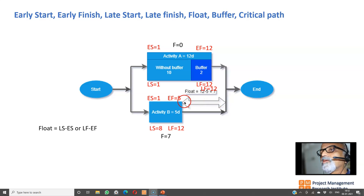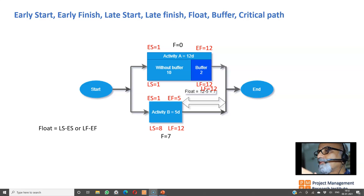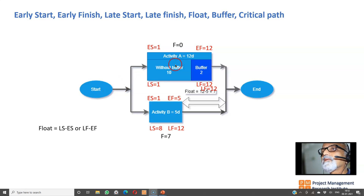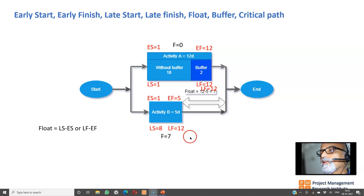Activity A is tightly constrained — it doesn't have float and cannot move around. Activities with zero float are on the critical path. Connecting all activities whose float equals zero gives you the critical path. In this project we have two paths: Start→A→End and Start→B→End. The longest path is Start→A→End, and the float of the longest path is always zero, whereas shorter paths have float greater than zero.